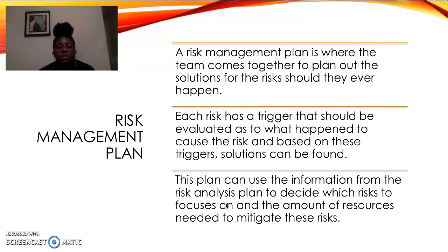And each of these risks has a trigger, so what would cause the risk to happen. So you can work on either preventing those triggers or better managing them. And it uses the information from the risk analysis plan to decide which risk you should focus on and which risk should require more management than others.